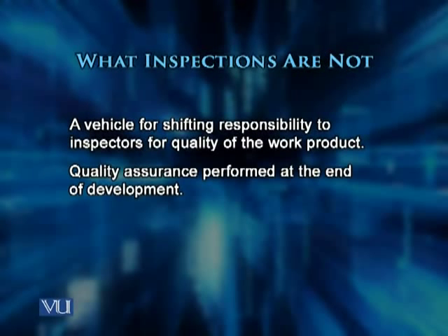Inspections are certainly not a quality assurance mechanism at the end of the development life cycle. These are mechanisms used while the software product is being developed, typically before the next development stage is started. The inspection activity is conducted and the work product is declared suitable for further development. At that time, the previous development activity comes to an end and a new development activity starts. So inspections are also a good way of baselining work products.